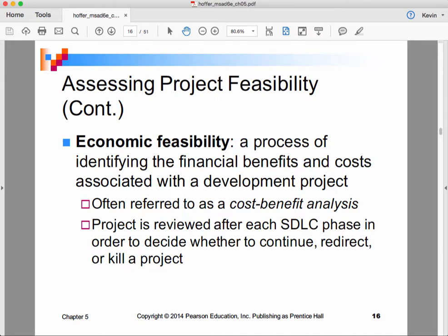It's consistent with the way we manage those kinds of projects that as we begin each of the sprints, it's possible for the product owner, who is, of course, representing the people who are paying the bill, to say, I think we have all we need. We just have to polish this up. Perhaps we need one more sprint to polish it up, and then that's going to be it.